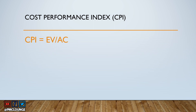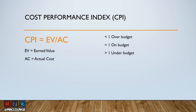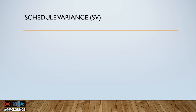Cost Performance Index, or CPI: CPI equals EV divided by AC, where EV is Earned Value and AC is Actual Cost. If the answer is less than one, you are over budget — bad news. If it equals one, you are on budget. If it is greater than one, you are under budget, meaning you are spending less money than planned.